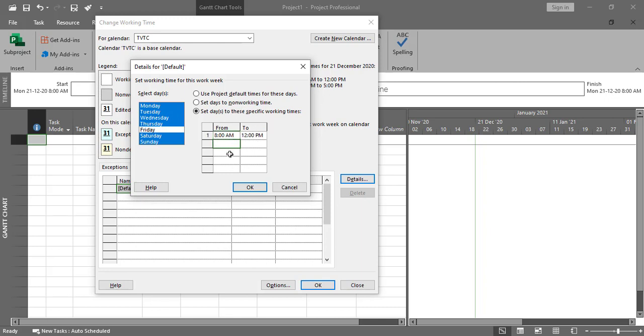Lunch and the prayer break. So 1 p.m. then again we'll start from 1 p.m. to 5 p.m. Okay, so this is how you can just add the time over here. 5 p.m. So this is our daily schedule. Okay, 8 a.m. to 12 p.m., then 12 to 1 will be lunch and the prayer break, and 1 to 5 p.m.